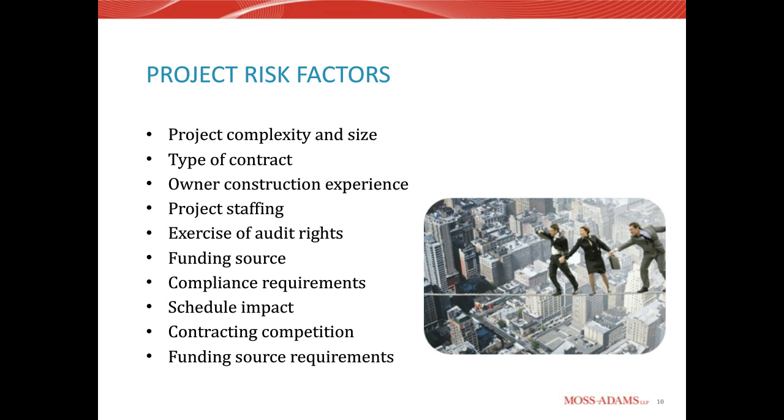And then the other one I wanted to bring up is the schedule impact part. We're not going to talk a whole lot about construction schedules here, but schedule impact's huge because it impacts a lot going down the line. It impacts the procurement of new items for the facility. It impacts the go-live date, and it impacts if you're potentially planning on getting out of or closing the existing facility that you were in and moving into a new facility. Could it impact your lease there? Could it impact the sale of that property? So schedule impacts can have a major impact downstream. So it's another one that we wanted to mention.